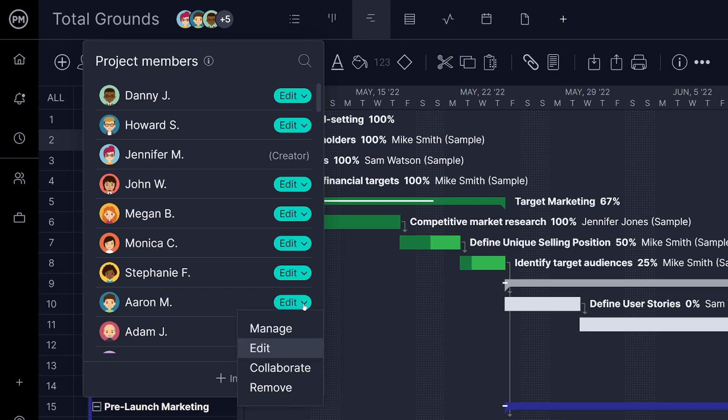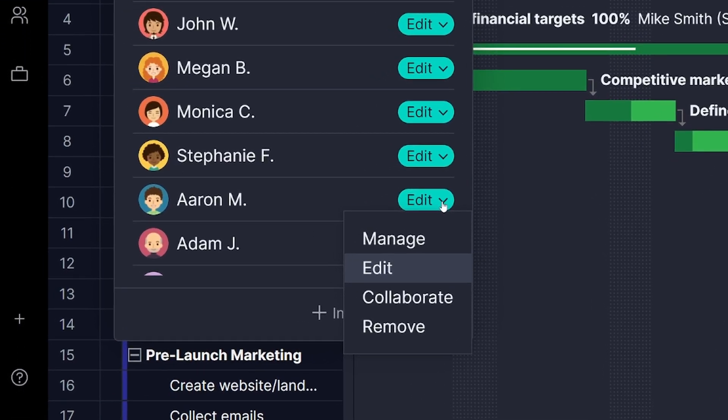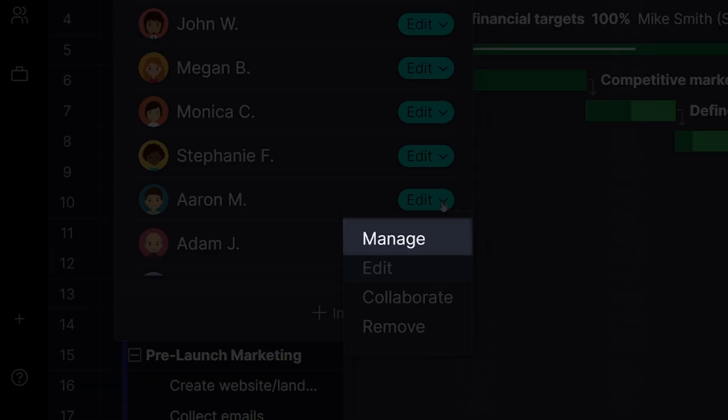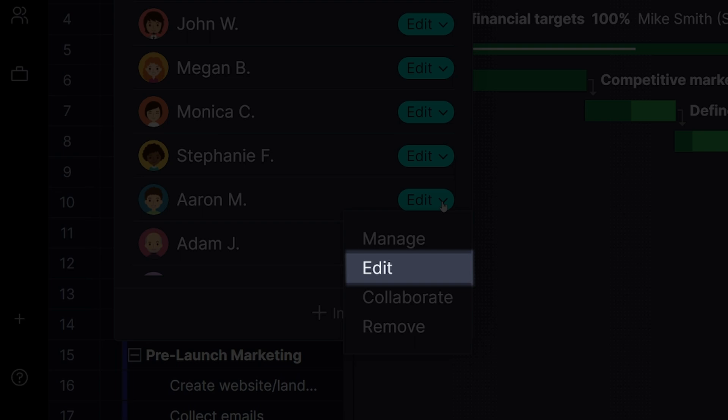Note that there are three different project roles which can be assigned to people and teams. These are applied on a per project basis, meaning a person can have different roles in different projects. A user with Manage access is given access to everything so that they can manage the project fully, including changing team member roles, editing important project information such as hourly rates and overall budget, and deleting the project when needed. A user with Edit access, which is the default role, will be able to edit everything except project settings.